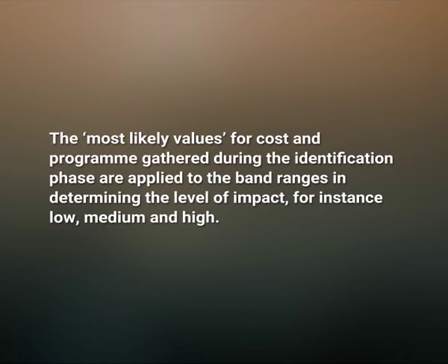The ranges of the impact bands are often determined at SBU and the project levels and defined in the risk management plans, RMP. The most likely values for cost and program gathered during the identification phase are applied to the band ranges in determining the level of impact.